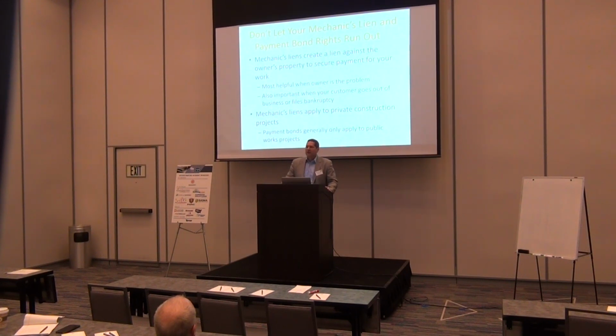It's most helpful, really, when the owner's the problem. I've had cases where the owner was the one who wasn't paying, and I was representing the general contractor, and we had a meeting with all the subs and said, I'm going to help you file liens. We're going to flood these guys with liens because we want everybody to get paid.